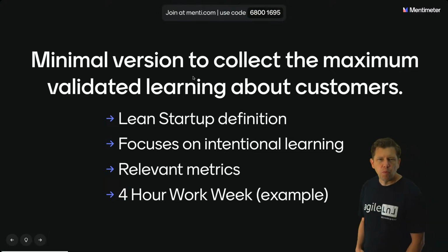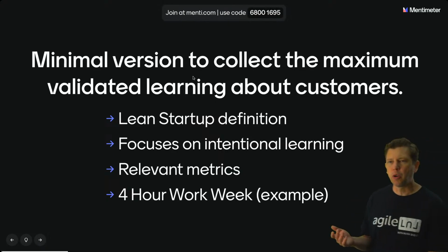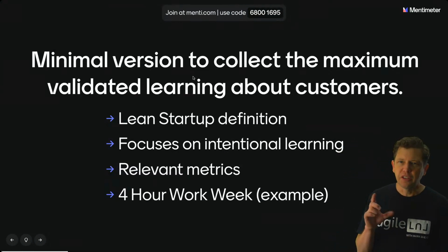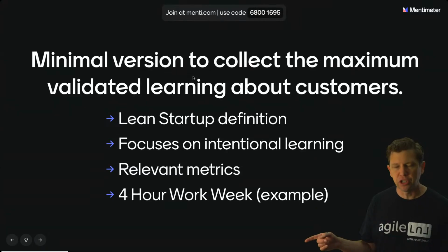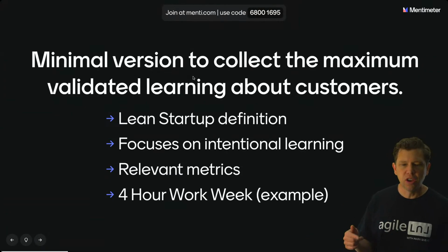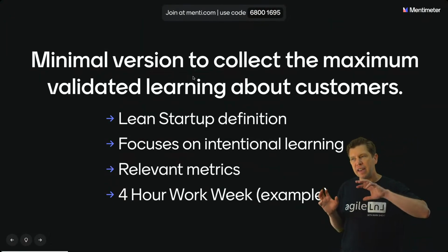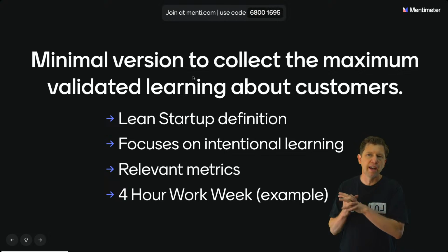What he found was that more people were interested in the idea of a 4-hour work week. The 2-hour work week evidently sounded too unbelievable. So his minimal version was just running ads that took people to a sign-up page to get more information later, just so he could start getting relevant metrics. I just want to introduce that this is an idea of a minimally viable version, something small enough that you can start interacting with your clients or potential customers in some way to get information.